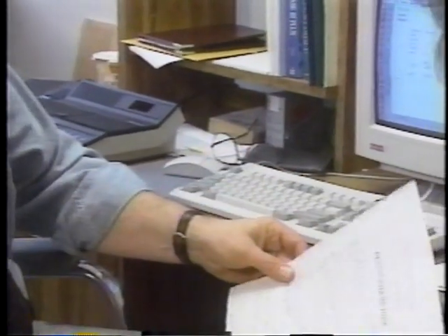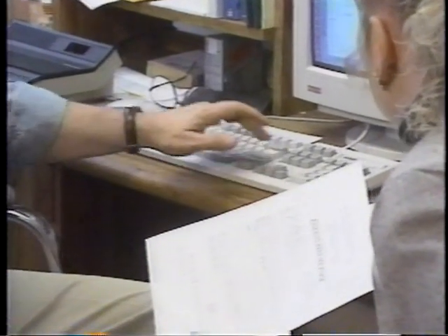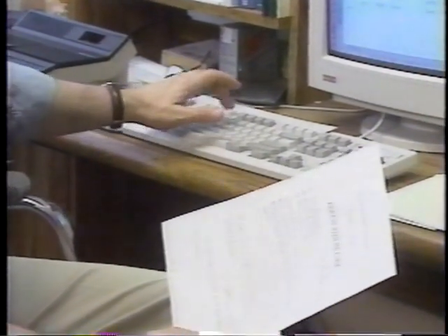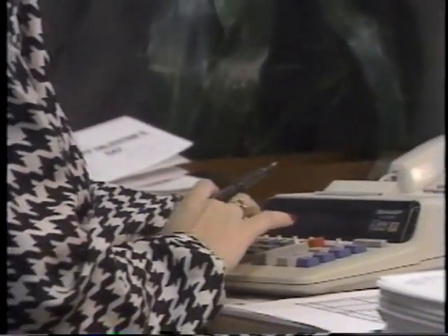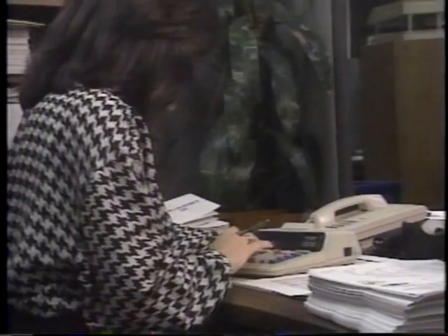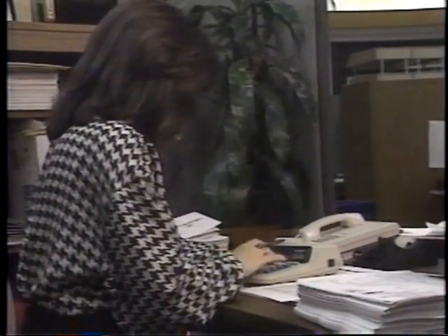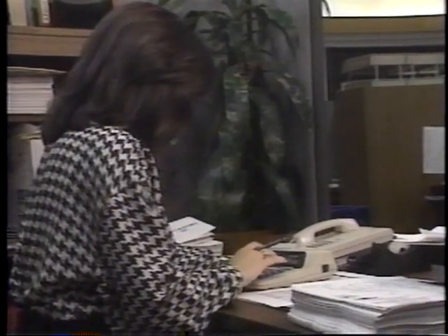Standard costs must be updated annually to allow for changes. Inflation, pay raises, and increases in fringe benefits all affect the standard costs. The same procedure used in developing standard costs may be used for updating. Review the computations and revise the data as required.